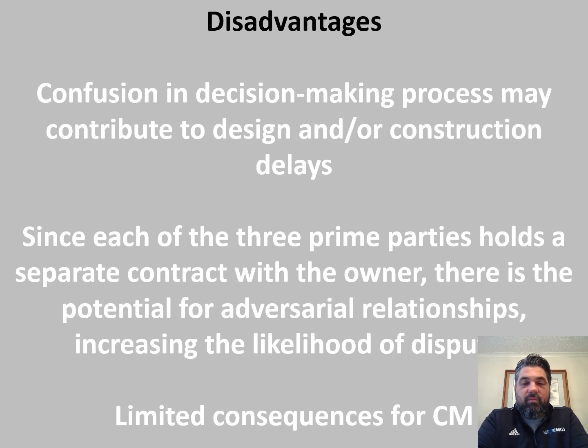And since the three prime parties hold a separate contract with the owner, there is potential for adversarial relationships, increasing the likelihood of disputes. So while there are advantages, there is additional risk as well. And interestingly, there are limited consequences for the construction manager as advisor. If the project comes in over budget or if it comes in late, they bear no responsibility for it. They just gave it bad advice, and so that's what it's chalked up to.